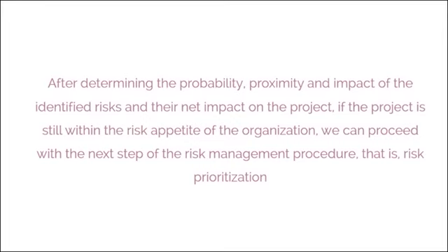After determining the probability, proximity, and impact of the identified risks and their net impact on the project, if the project is still within the risk appetite of the organization, we can proceed with the next step of the risk management procedure, that is, risk prioritization.